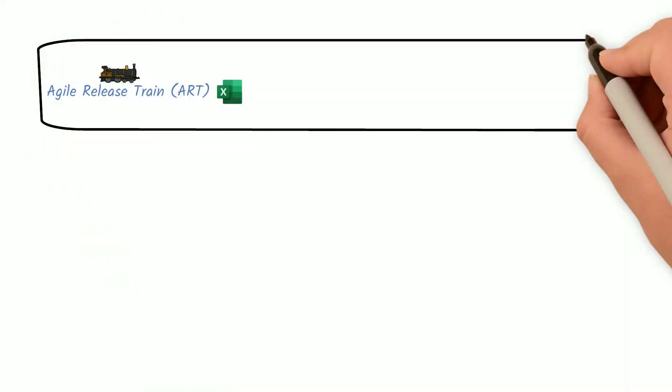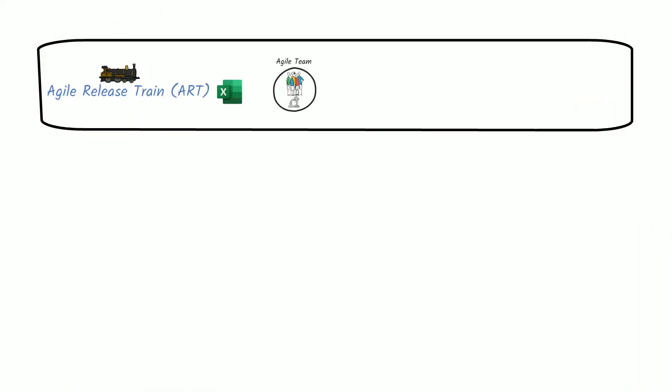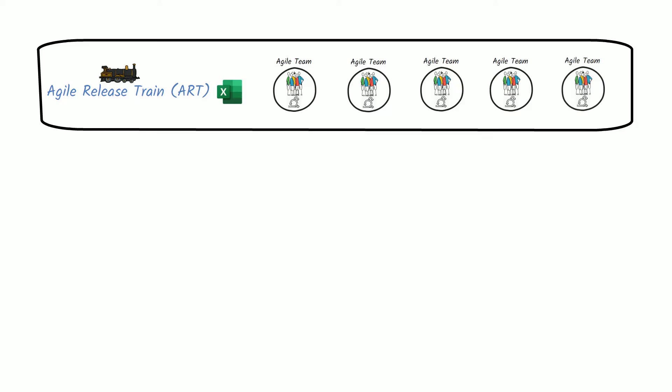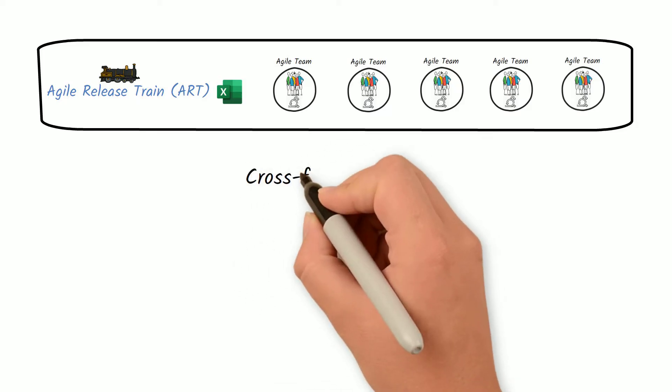In the Microsoft Office example, Microsoft Word could be one Agile Release Train, PowerPoint another ART, and Excel another, and so on. One ART can be composed of anywhere from 5 to 12 Agile teams operating using Scrum.